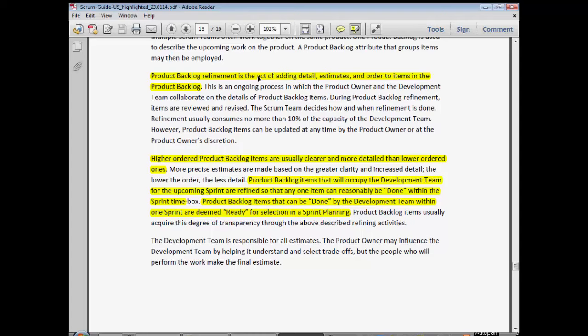The key thing about refining the backlog is making sure that the items are ready for planning. Before you even go into planning, the features that come in must be broken down to a size that the team could complete and get completely done within one sprint. This is something that should it come up in one of the certification exams, it's really key that you understand that concept in depth.